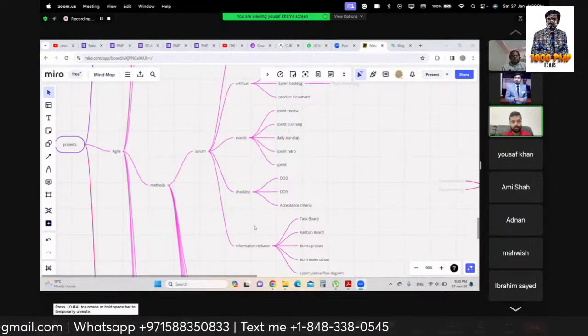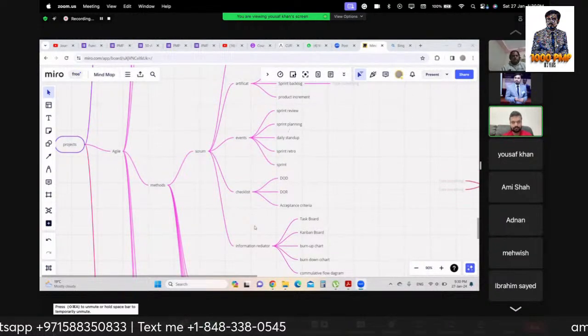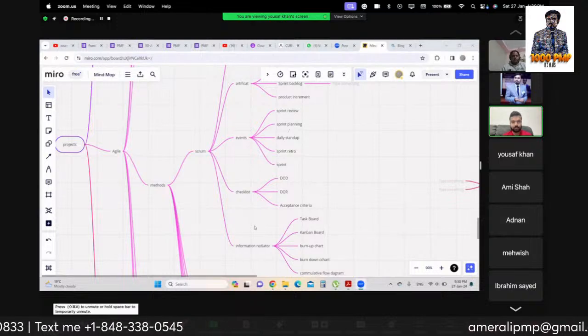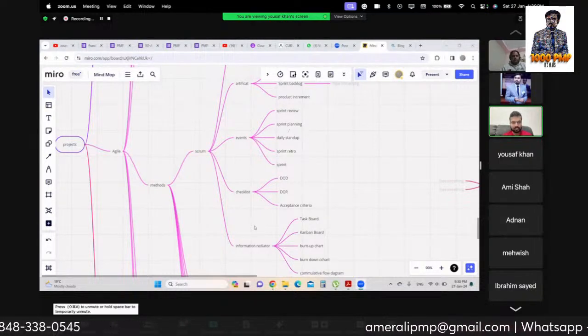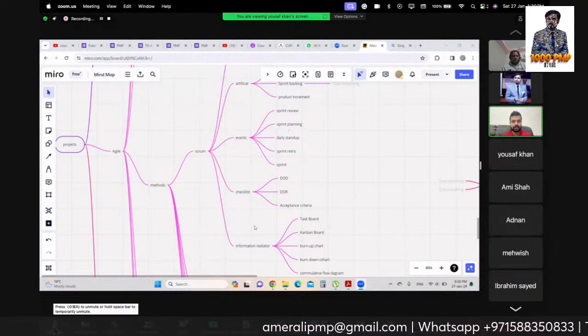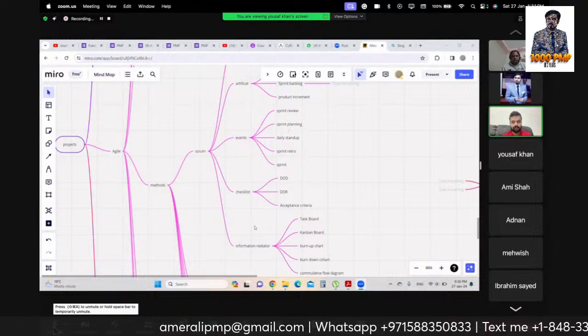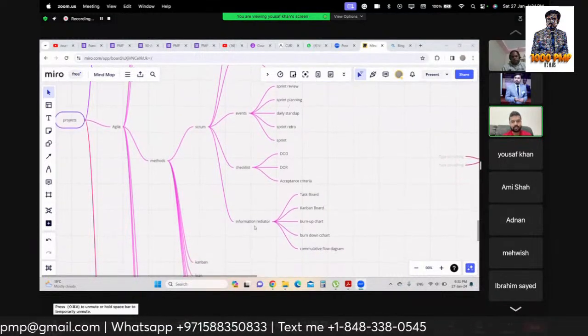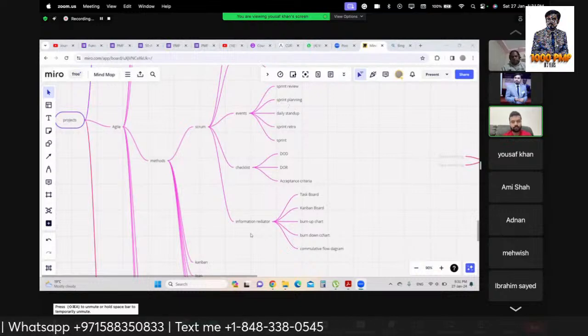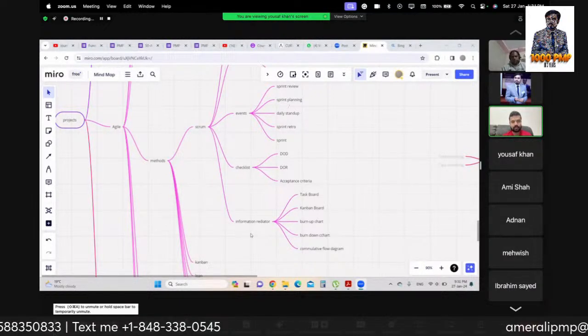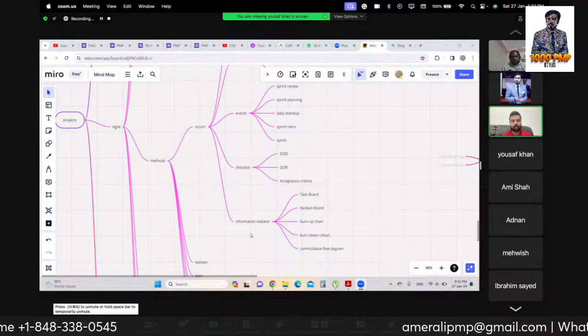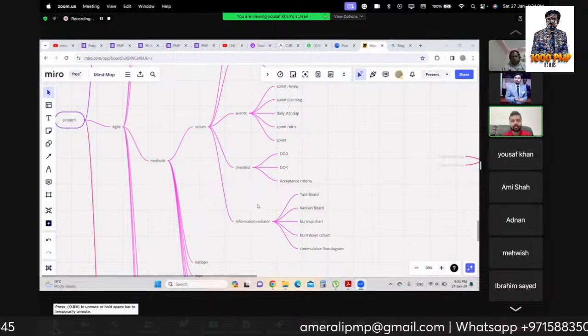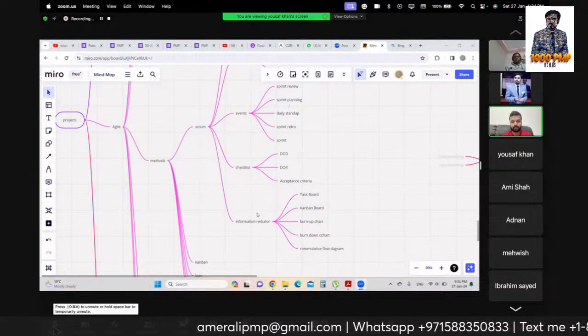This is done with the team of product owner, Scrum master, and team. So this will be a Scrum process where 3 checklists will be there in the sprint: definition of ready, definition of done, and acceptance criteria. If the item is accepted, it will go to the product increment. In case it is rejected, it will go back to the product backlog.